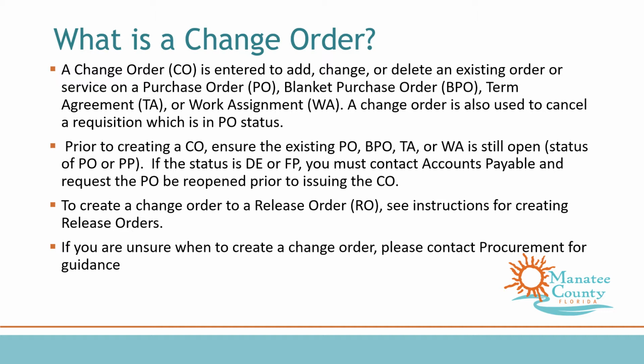Prior to creating a change order, ensure the existing purchase order, blanket purchase order, term agreement, or work assignment is still open. Status should be showing of PO or PP. If the status is DE or FP, you must contact accounts payable and request the PO to be reopened prior to issuing the change order. To create a change order to the release order, see instructions for creating release orders. If you are unsure when to create a change order, please contact procurement for guidance.